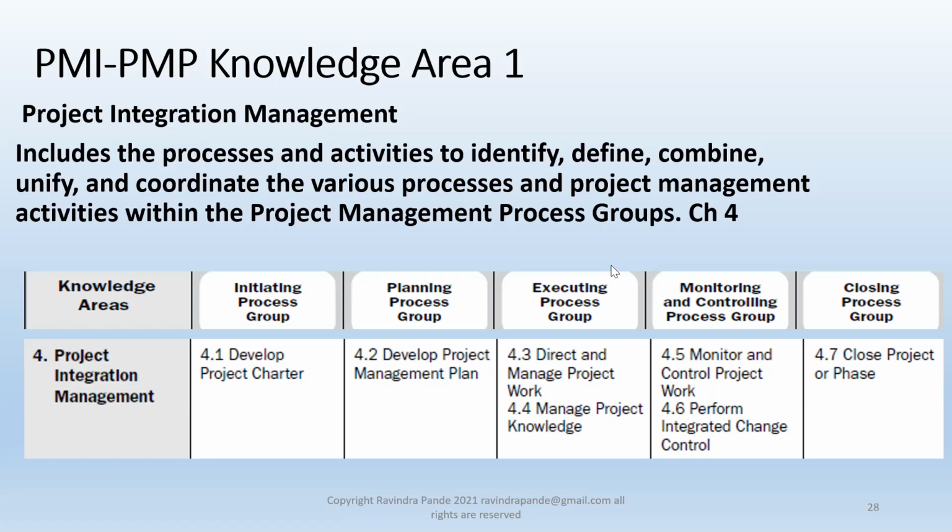Then develop project management plan. Again, this is also kind of a reference document, or what can normally be called an appendix or attachments. Here, develop project management plan is an umbrella plan where we have all the 9 other plans included, like a summarized project management plan. So you should have a scope management plan paragraph or a chapter in it. You can have a schedule management plan in it, which can be a 1 or 2 page summary, and so on. So you have all 9 project management plans included in develop project management plan.